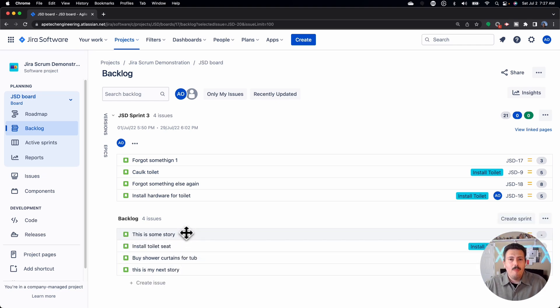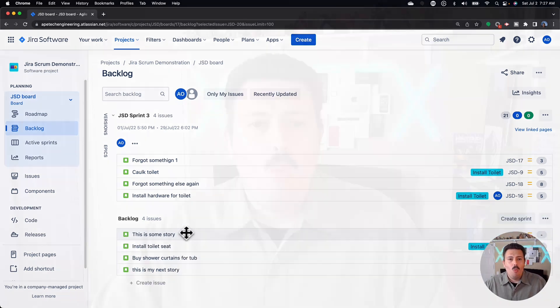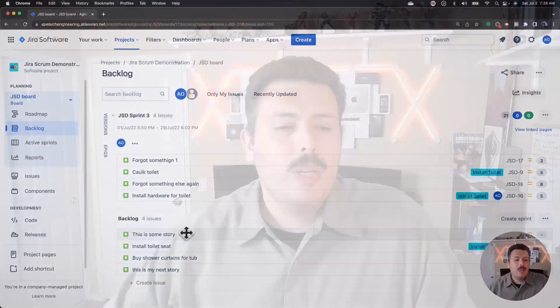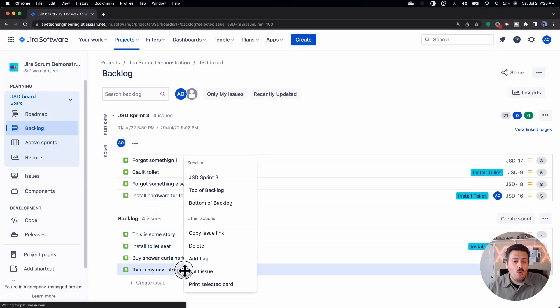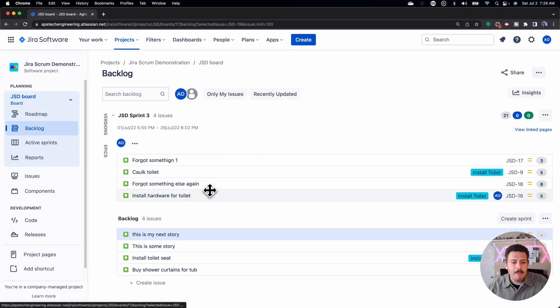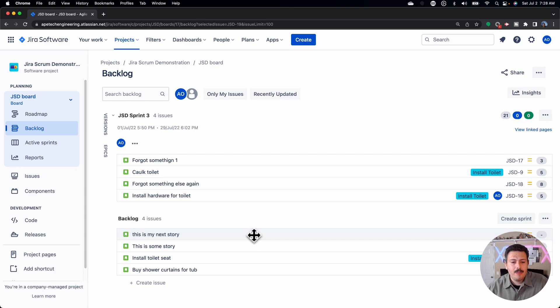If you have way too many stories — maybe you have a giant backlog and it's something that was just added and it's like 100 issues down — you can actually just right-click on a story and send it to the top of the backlog.